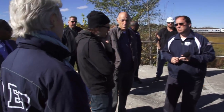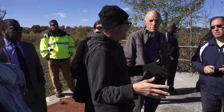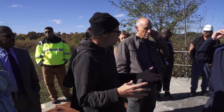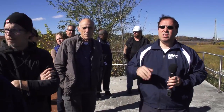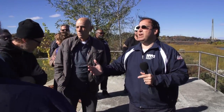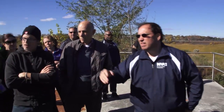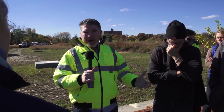EPA expressed some concerns about having the tank so close to the water's edge, but we didn't get much background on what those concerns were. If you could shed some light on that. Kevin will tell you. Kevin, the question was why EPA is concerned about having the tank so close to the canal. We know about groundwater, but you can talk about that. Sure. When you are building a deep excavation anywhere, you have to construct what's called the support of excavation first, which is basically walls that are going to support the hole that you're going to be digging.